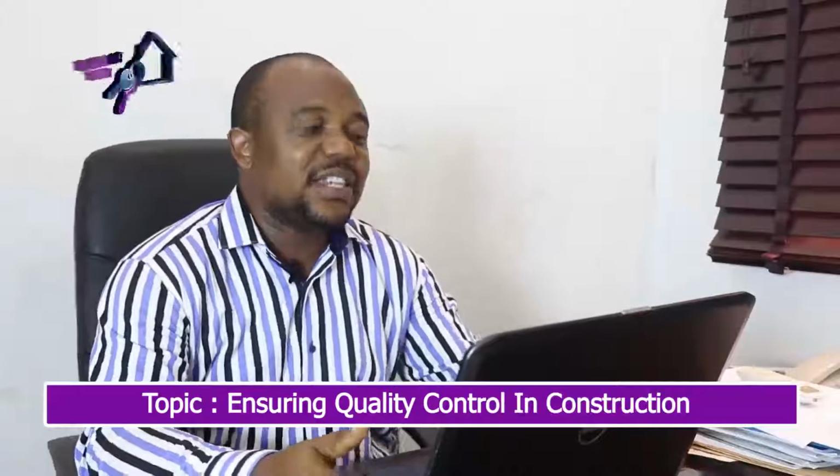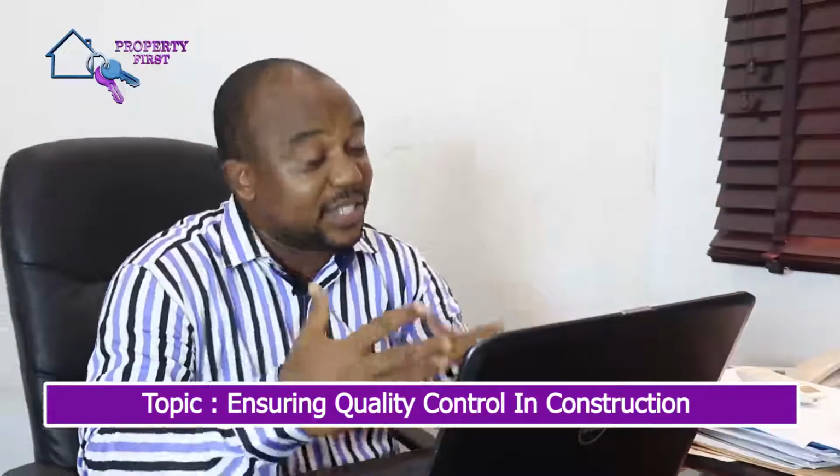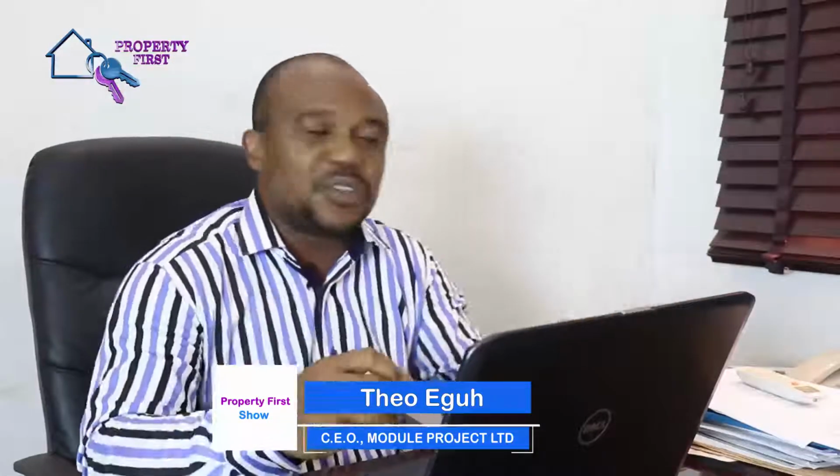We definitely cannot talk about quality control without talking about money. How does the quantity surveyor ensure that the client gets value for his money? One, by adhering to the contract agreements. What do I mean by that? When you talk of a project contract, for example, a building contract, there's what we call bills of quantities prepared by a quantity surveyor. In that bills of quantities, it entails the description, the scope, and the quantity and the price of that contract, all inclusive in that bill of quantities. So the QS will ensure that the contractor adheres to that description as described in the bills of quantity. These are part of the roles of a QS to make sure the client gets value for his money.